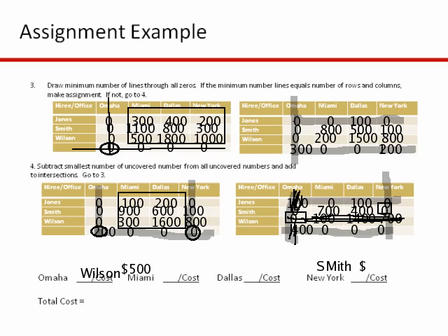Okay, come back over here, $800. And then I eliminate Smith from being assigned anywhere else. So what I'm going to do here is I'm going to just cross out Smith from being assigned, and I'm going to cross out New York from being assigned anywhere else, okay? Okay, then it looks like we can send Jones to Miami.